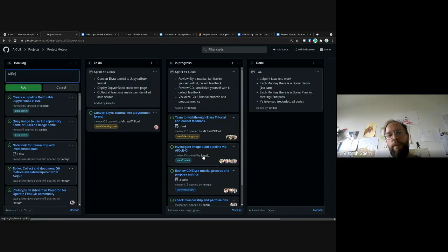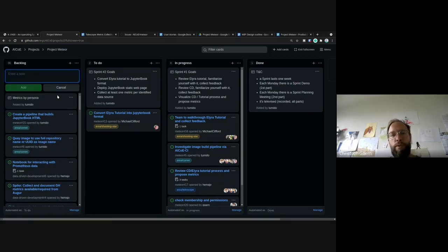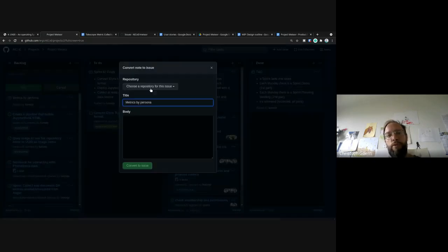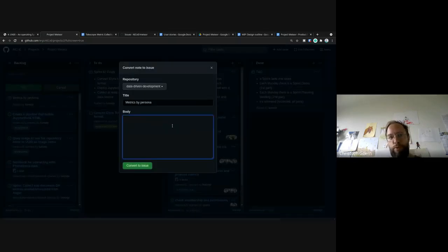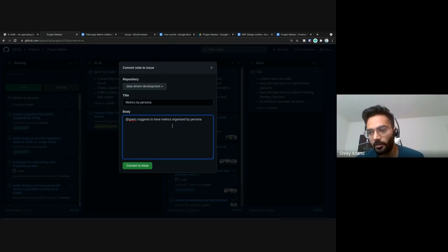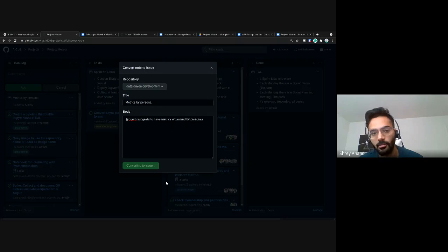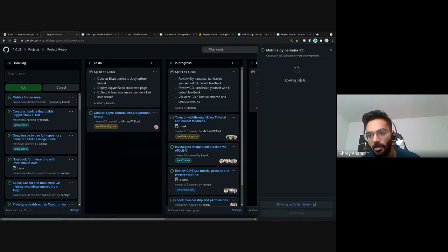Most often personas have something like a fancy name. So it's Steven Storage, which is like a 5-year in business storage administrator, specialized in container storage, so that you have a little bit of story describing that person, that persona. It is basically, I guess, a leftover from all these Dungeons and Dragons stuff that all these IT guys are into. So I guess the first thing would be to identify all the personas that we want to target, and then once we have that, we can group the metrics based on them.